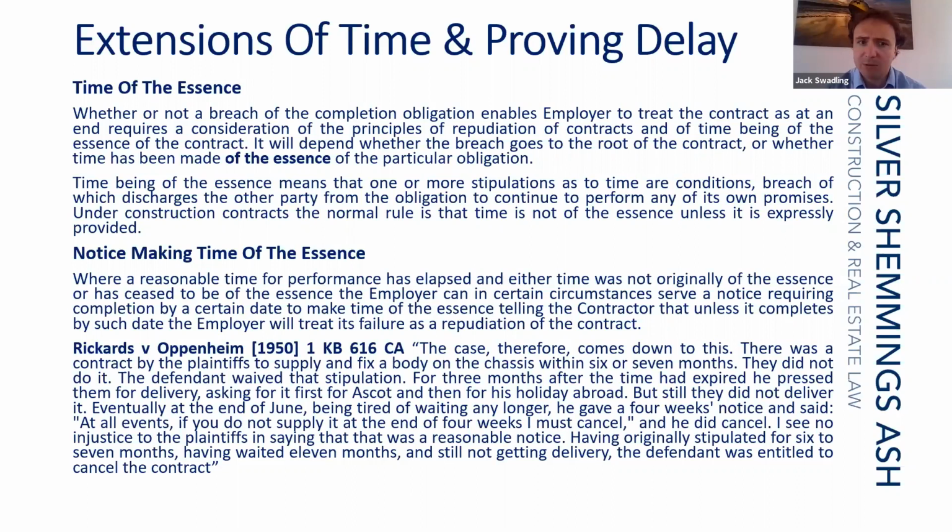The only key point to take out of this, I suppose, is that it's not really an issue that poses great problems under the standard forms of contract. In the usual course of events, if you do not complete by the completion date, it's a breach of contract, but it does not entitle the employer to treat the breach as a repudiation.